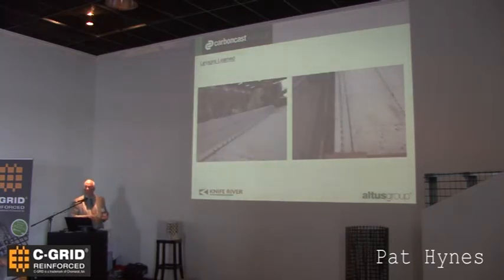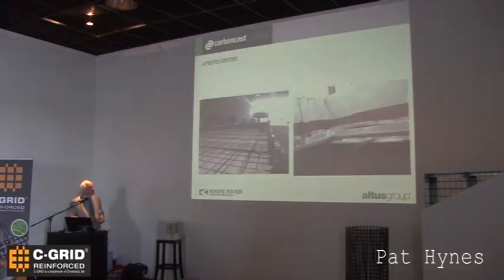Another problem we encountered, this is on Sandy High School, is the insulation has to come up, and then we have to turn the corner. We had to make sure we didn't get enough head pressure, because we put a form along here, and enough head pressure pushes that insulation out of place. So we had to learn how to hold that in place, and then how to put another piece inside of it. It was a learning curve, and I think we had a reject panel before we figured out how to do it properly.